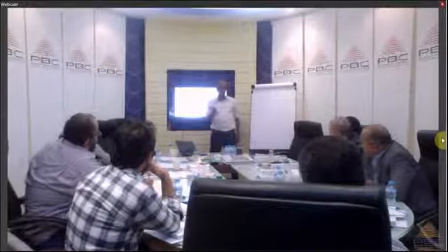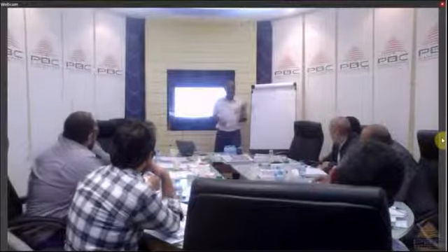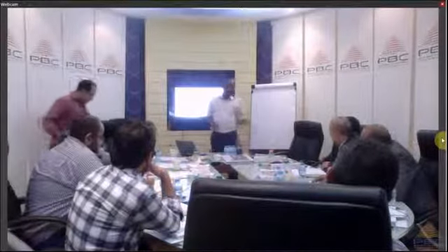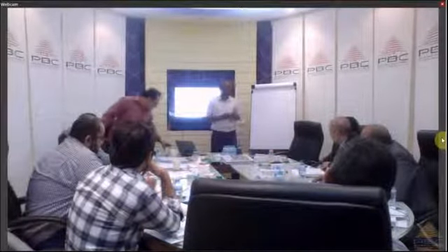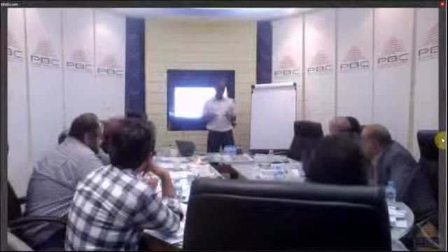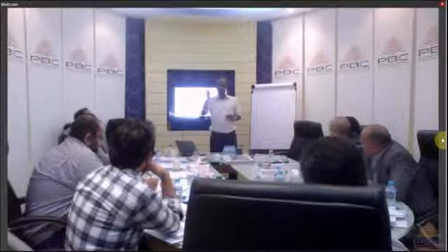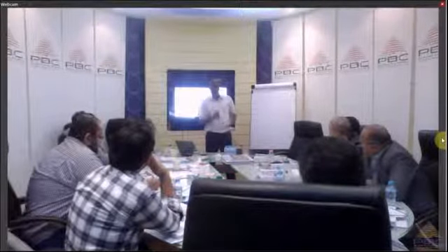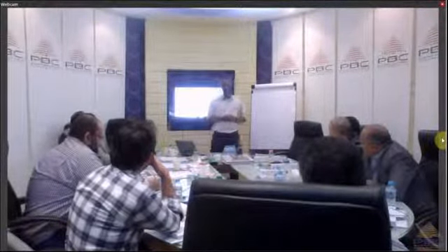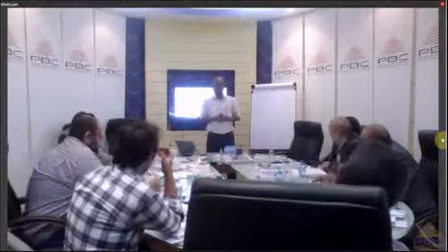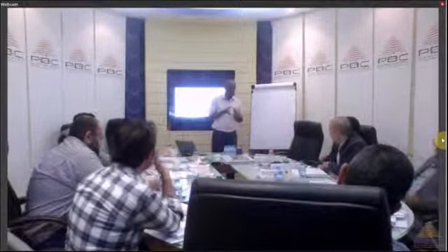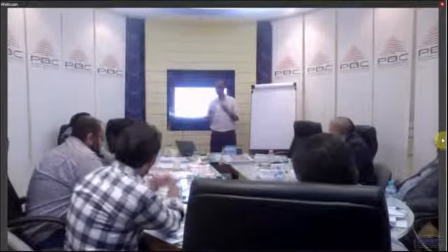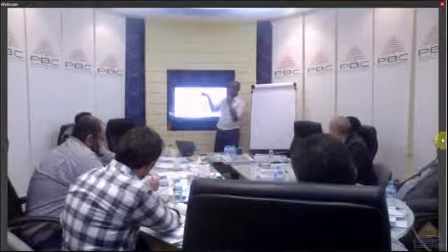A milestone is an activity, but it has a duration of what? Of 0 days. So, a milestone is an activity, but with a duration of 0. Why? Because it's a moment, isn't it? So when you say the opening of the company, the moment of the opening is an event, right? An activity with a duration 0 because it just happens, and that's it. So that's the definition of a milestone, an activity with a duration 0.